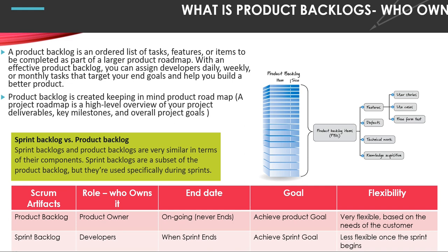It will change frequently, with items being added or taken out on a regular basis. It will be larger than the sprint backlog. Generally, it will also have items with a mix of granularity levels, with few items broken down below the user story level. It is overseen by the product owner.